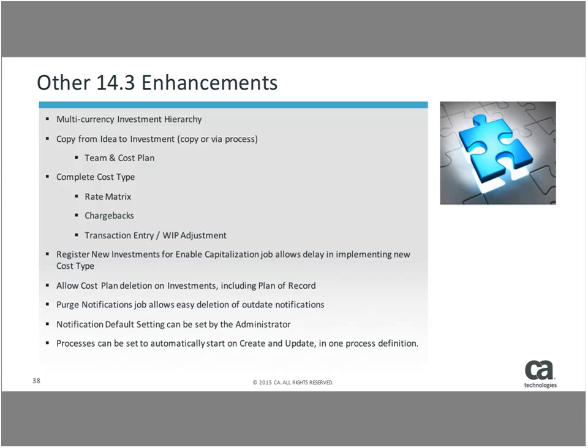And then I won't read the rest of these, but the one that I think is not on here that I know will make some folks very happy is that we have also added the ability to schedule post to WIP as a job. So you no longer have to go in and hit the little button just to be able to do the post to WIP. It is now available through the scheduler to run the post to WIP job. So that is another piece there in addition to what we have listed here.